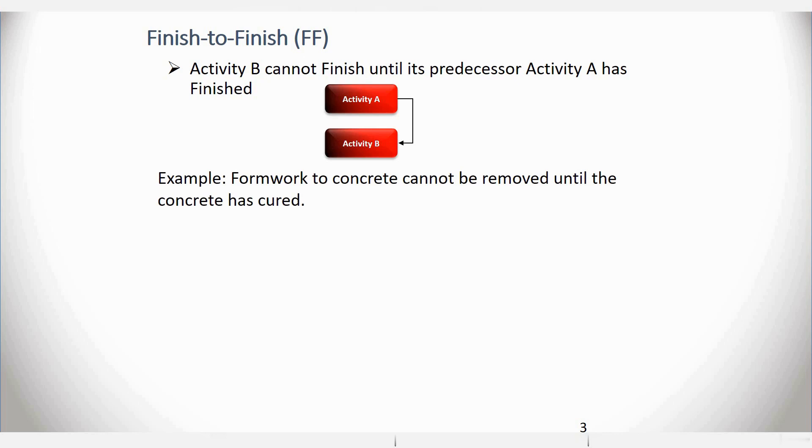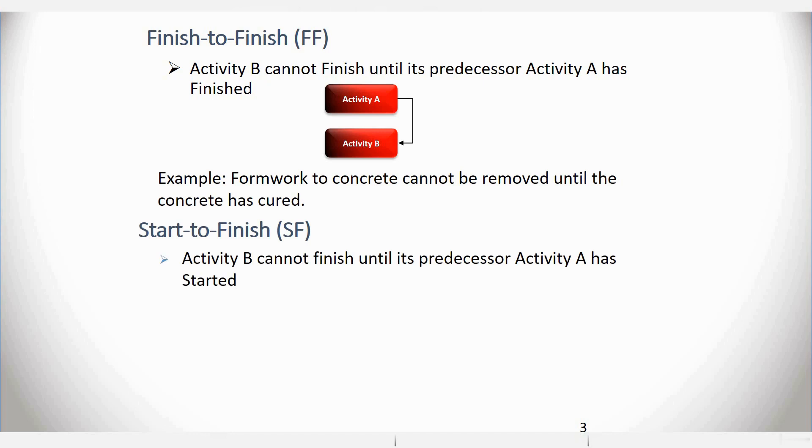Another example, Formwork to Concrete cannot be removed until the concrete has cured. And finally, we have a Start to Finish logical relationship. Now this type of logical relationship is not very commonly used.